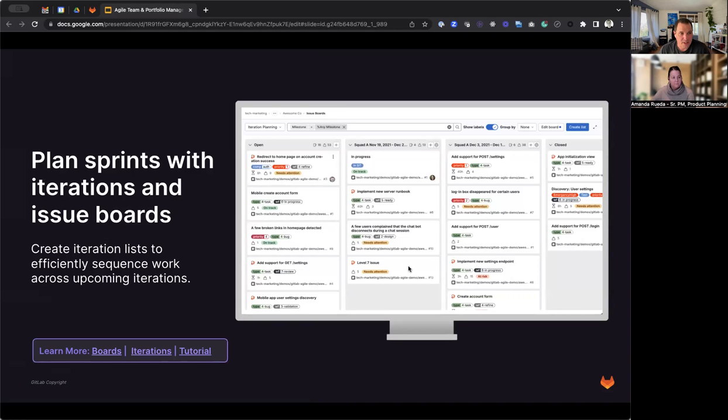Iterations are the heartbeat of our continuous development framework, offering fixed, time-boxed development sprints that can span between 1 and 4 weeks. These iterations provide a dynamic rhythm to your workflow, where individual user stories are assigned to iterations, ensuring they progress within well-defined development cycles. Iterations bring agility and focus to your day-to-day development efforts.